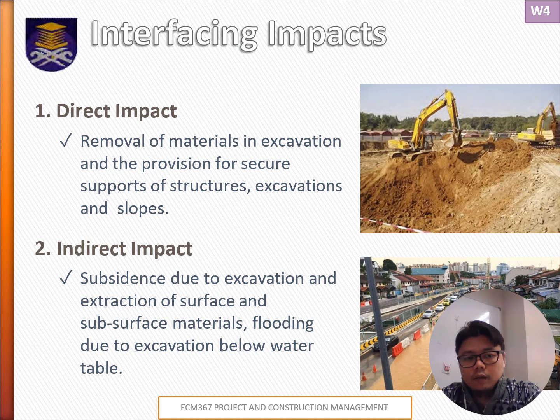And then there is the indirect impact, which may include the consequences of these alterations on the site's future use, the local ecosystem, or nearby structures. For instance, drilling that lowers the water table could cause nearby wells to dry out. Or if you dig deep enough that you reach below the water table, it could cause water to seep into your excavation site. This can lead to flooding or the gradual sinking of the ground, what we call subsidence. Also, the use of heavy machinery could lead to soil compaction, affecting future building foundations.